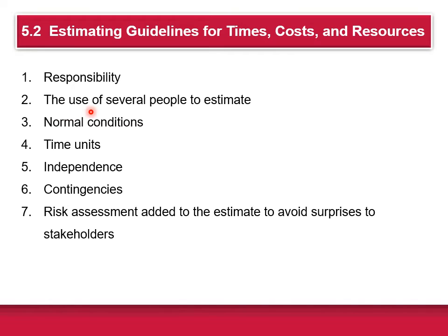The second guideline is to use several people to estimate. A cost or time estimate usually has a better chance of being reasonable and realistic when several people with relevant experience or knowledge of the task are used, because they can compare notes.